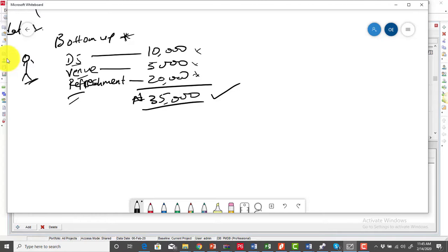So if you notice, that's exactly the type of estimating that Primavera adopts. If you go back to our earlier example, you notice that the cost of an activity is basically how much the resource person is going to be earning, multiplied by the number of days, which is exactly how we now come up with the cost for that particular activity.